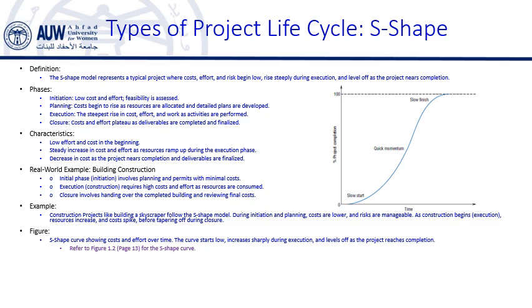As the project nears completion, it enters the closure phase, the last phase, where progress slows again as we are delivering all of the results of the project, creating the tail end of the S, as you see in the diagram. During this phase, the focus shifts to completing remaining tasks, finalizing documentation, which is a very important aspect in project documentation, and handing over the deliverables to the clients.